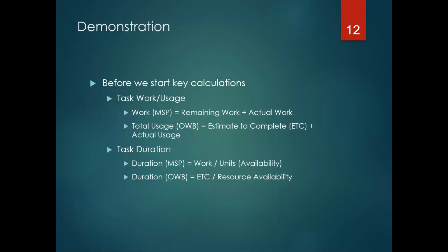One of the things that recent versions of Microsoft Project come out with is that the default is that tasks are not automatically calculated. My sense on why that occurred is that I had heard, at least in the environments I was in, the frustration with Microsoft moving the dates and driving the project managers crazy. Well, if you don't have the tool calculating anything for you, yeah, it won't move the dates and you can keep them. And debatably then, that schedule is just for reporting purposes only. It's there to look good and look nice, which Microsoft Project does exceptionally well. But essentially, you're not necessarily